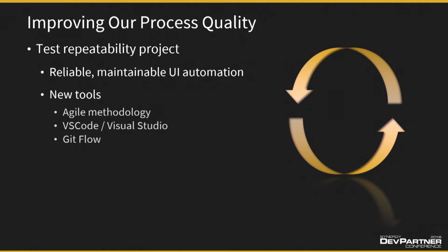We are using Azure DevOps for work tracking. It has proven a very useful tool in attaching documentation such as acceptance criteria to tasks that can be directly linked with their respective code changes. Azure DevOps helps provide an overview of what each team member is working on, making it easier to manage progress in daily team meetings. It helps us estimate an effective burn down to establish delivery dates.